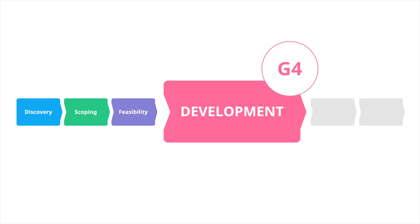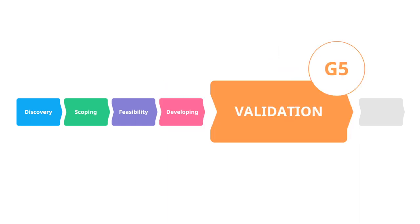The fifth phase is validation. Its goal is to validate the prototype through testing, determining whether it delivers real value and meets the needs and objectives defined in earlier stages. This step is all about polishing rough edges, testing marketing and distribution channels, and testing processes around the product. While early-stage testing took place in the previous phase, now it is time to see the product in action and gather as much feedback as possible, making final tweaks and fixes.